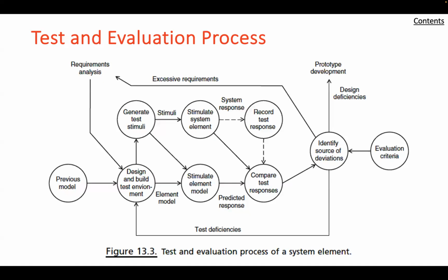Well, another thing that needs to be thought through and considered is what do you do if there is a test failure? Is it a significant failure? Did it uncover an unknown that folks were not aware of? All of those are things that need to be thought about. The failure may be spectacular and publicly visible, or it may not. And because the failure is unexpected, there's a period of time before a proposed solution can be implemented. During this time, the impact of the failure on system development has to be considered, and you have to adjudicate whether or not it is actually serious.